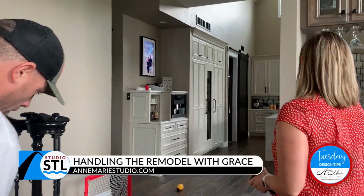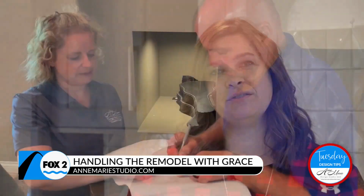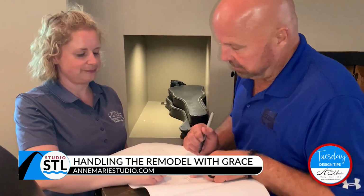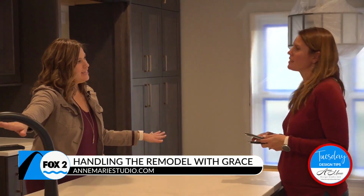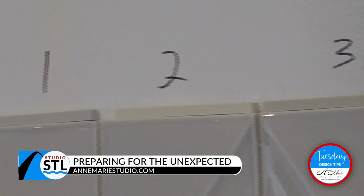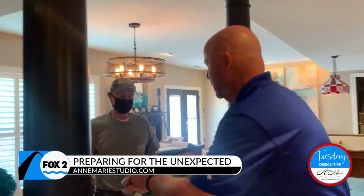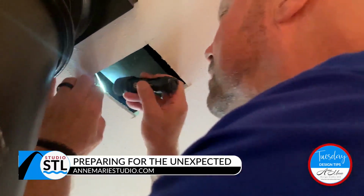So when we are doing an installation on a project, we are here a lot. We have different team members that come for different time frames. For example, we do deliveries to your house. We like to inspect all the products that we get delivered. Cabinetry, plumbing items. We make sure that the products are correct, the right quantities are here, the right color, make sure nothing's damaged. That way we can make sure things stay on track the whole entire time. Making sure this team avoids hiccups in your giddy-up, so you can enjoy your new space as soon as possible.